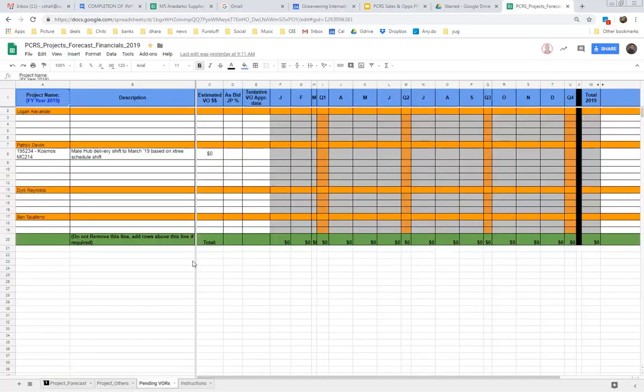All the VORs we talked about. If you have a VOR, it goes over here. So we'll put it here, we'll get your name. Any VOR you have on your project, which you send to the customer, even if it's pending, we'll log it over here so we keep track of the potential, like the sales forecast.